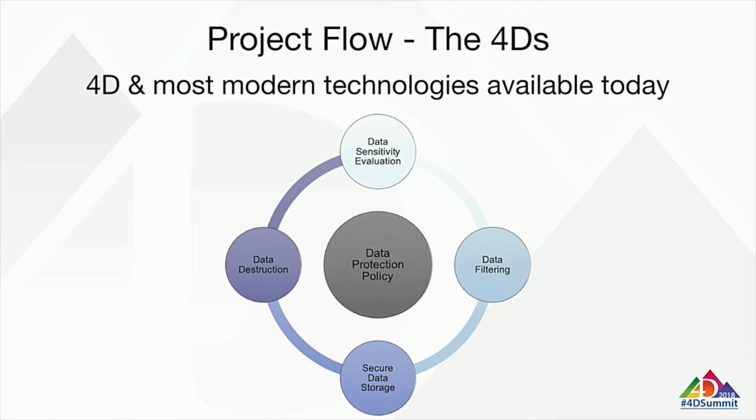Just to give you an example, if your data files are mainly related to health or private life, we will not recover your data file. We will perform the developments locally, and when we need the data at the final phases of the project, for example for testing, we will do this remotely or on your premises. Then, if we judge that the risk is not very high, we will try to filter the sensitive data as much as possible. We can work with you on this, for example, by encrypting them.